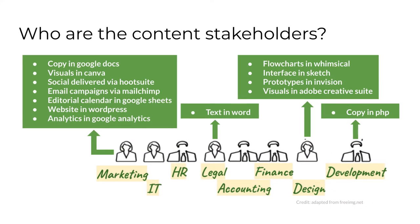The first task in planning a content strategy development project is to determine who the content stakeholders actually are. As discussed in the Module 1 lecture, in the vast majority of businesses there's no centralized job role or individual who manages all of a business's content. Rather, it's a content ecosystem made up of many employees within different business units. The book Enterprise Content Strategy includes a table with 15 different potential business units listed as content stakeholders and possibly members of the content strategy development team.